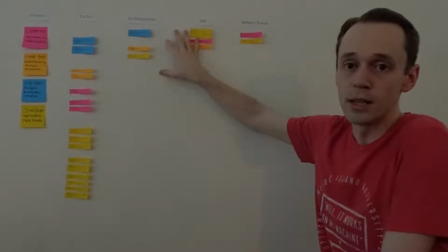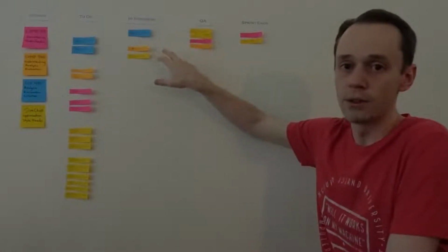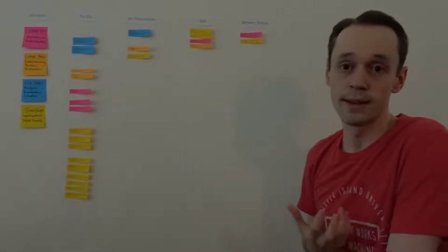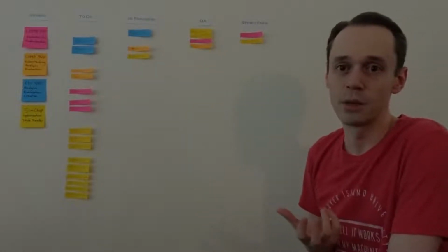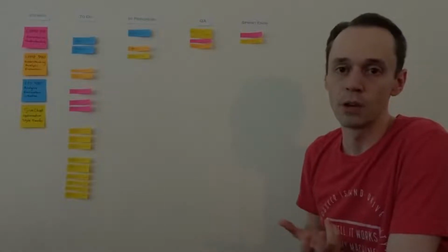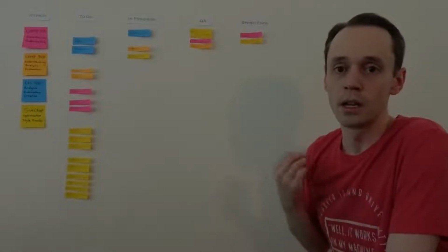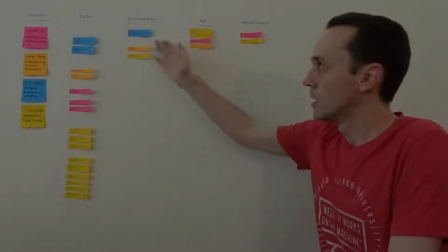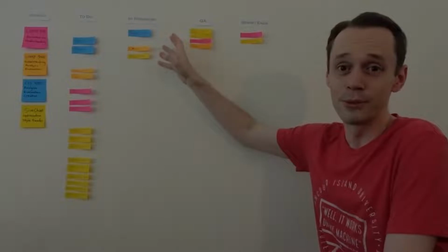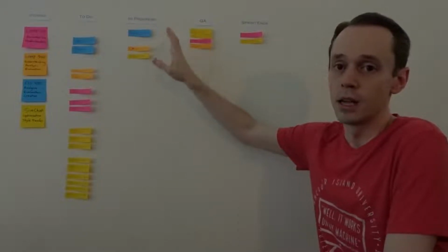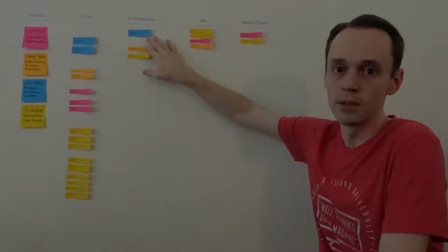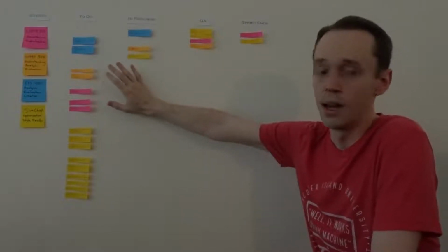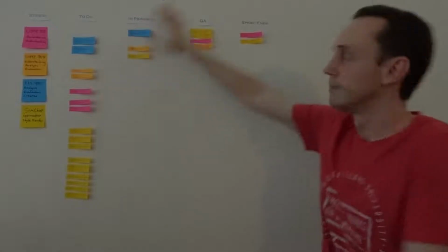And when I'm finished at the end of the day, I take a look at what's left and I ask myself, is this a description of a task that really is going to take me about 1 day? So after I've worked on it for a little while, I get a better idea of how I might refine that. And I might take that task, break it down into smaller pieces, and then I place one of them and leave it in the in progress column, and I'll place the remaining tasks back in the to-do column.